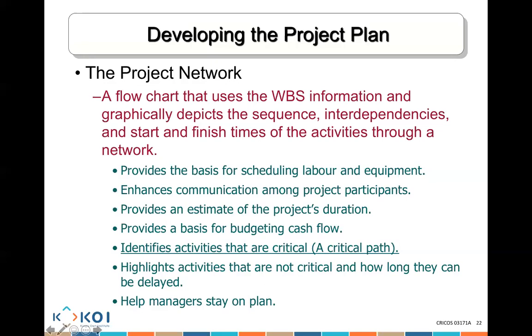Because we know what comes first and what comes next, and we know the relationship between the activities, we know the duration required for each activity, we know when each activity needs to be done, it will give me a basis. I can use it to schedule my labor, when do I need them, schedule my equipment, when do I need it. It's going to help me to enhance communication among project participants, because if, for example, I have task 2 that is reliant on task 1 and they're done by different people, task 2 person will be able to speak to the person doing task 1. Make regular communication to try to ensure the job is done when it's supposed to be done.